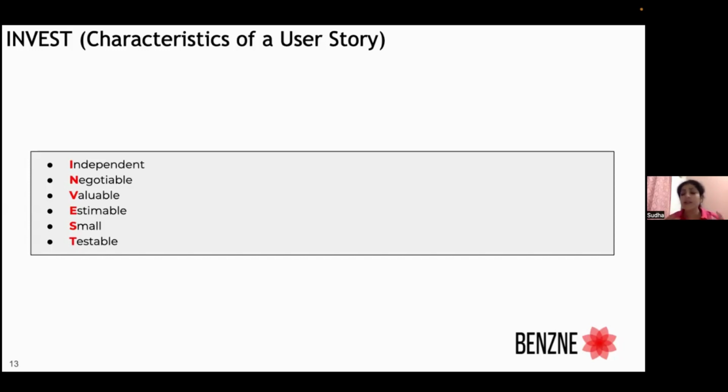Along with that, when writing user stories, keep in mind that you have to be able to easily order them, easily prioritize them. That automatically gets you into the mindset of making a user story independent. You can't avoid dependencies, but what I'm trying to say is minimize them. Secondly, Agile is all about collaboration and communication. So when building a user story, bring business and developers together, bring a lot of communication and collaboration between these two sides to make your user story more meaningful.